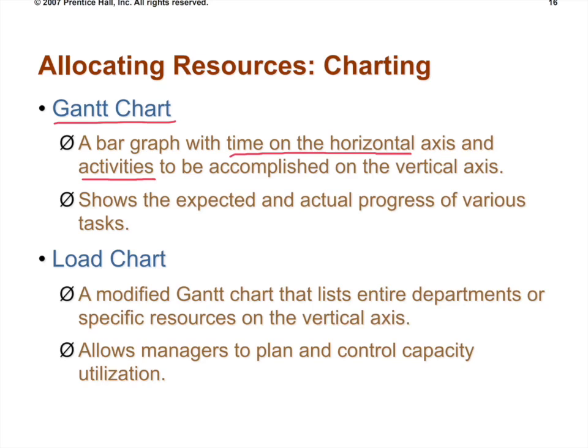But in the Gantt chart the vertical is the activities, while in the load chart it is the specific resources. That is the difference between the Gantt chart and the load chart.